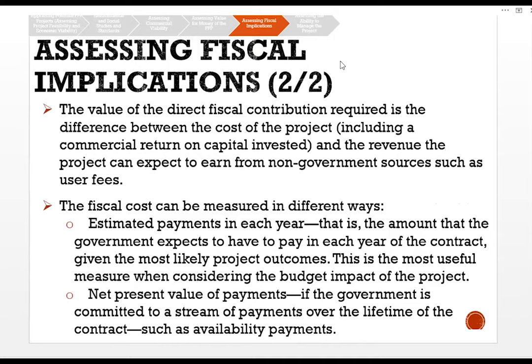Assessing fiscal implications: the value of the direct fiscal contribution required is the difference between the cost of the project — including a commercial return on capital invested — and the revenue the project can expect to earn from non-government sources such as user fees. The fiscal cost can be measured in different ways: estimated payments in each year, that is the amount the government will have to pay in each year of the contract given the most likely project outcomes — this is the most useful measure when considering the budget impact of the project — and the net present value of payments if the government is committed to a stream of payments over the lifetime of the contract.